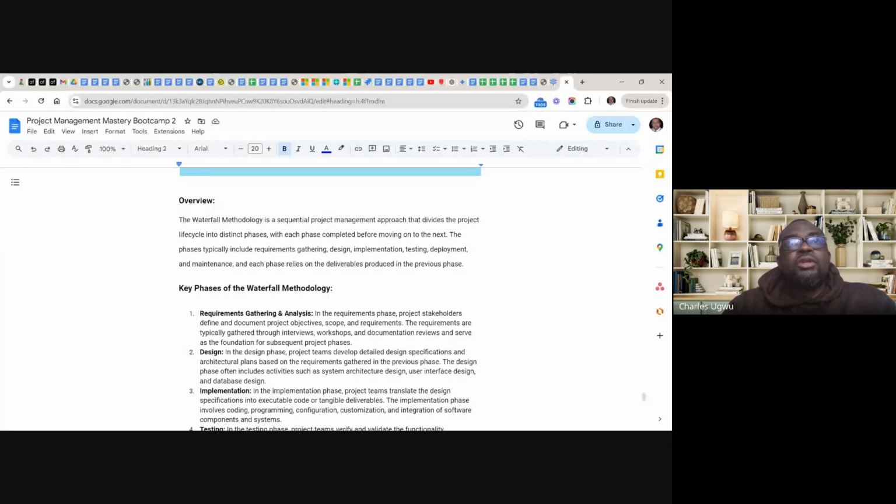And if you come to design stage, it's still Waterfall. But when we go to implementation stage, you can call it implementation or deployment, when you want to deploy the solution or execute the solution, you migrate to Agile so that you can use Scrum. And this is what we've been doing. So many companies are combining Waterfall and Agile approach.